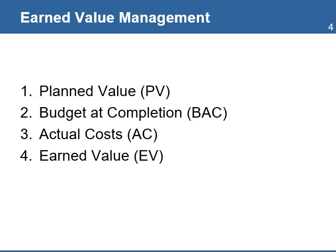Budget at Completion is the value at the end of the project. It is calculated at the start of the project based on the project work and its individual components. Actual Cost is the total direct and indirect costs incurred in accomplishing the work of a project during a given period of time.